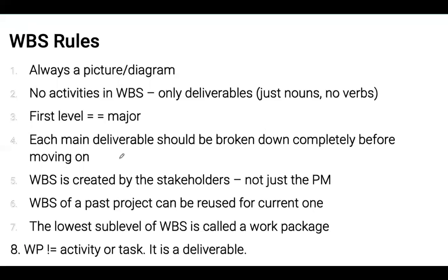Critically, if you're doing the work breakdown structure, stakeholders should take part because it's going to be the stakeholders that have a sufficient amount of knowledge required in order to break down each deliverable into meaningful work packages. Then, the work breakdown structure of a past project can be reused for a current one if the project is similar.